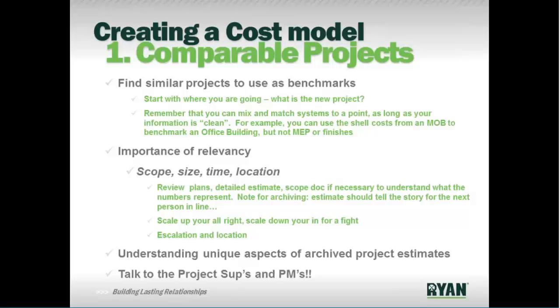So we all know that sometimes steel will go up faster than drywall, or lumber will go up, and that different materials may escalate at different rates. But just understand that when you apply that percentage, it's applying it across everything. So again, difficult to get the science down to a T, but we know those things exist, and so we're dealing with them best we can.